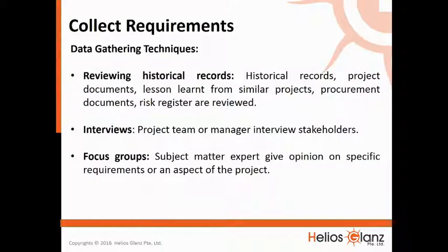Data gathering techniques. Reviewing historical records: historical records, project documents, lesson learned from similar projects, procurement documents, risk register are reviewed. Interviews: project team or manager interview stakeholders. Focus groups: subject matter expert give opinion on specific requirements or an aspect of the project.